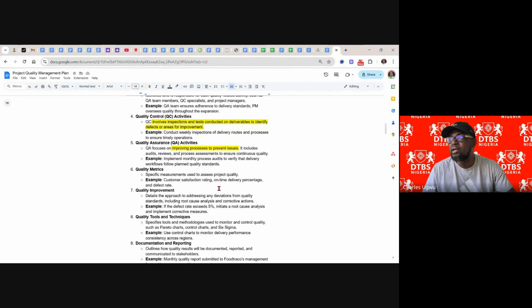We can say that for us to be satisfied, customer satisfaction rating at all time must be at least 4.5 against 5 points. So 4.5 star rating. Anything below 4.5 is below company standard. You can use that as a rating. You can say 95% the rating. So you must have a standard.